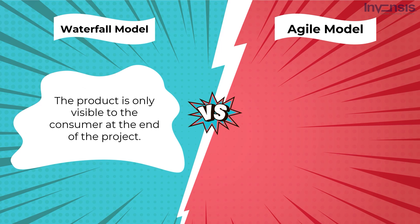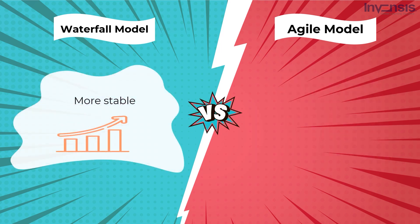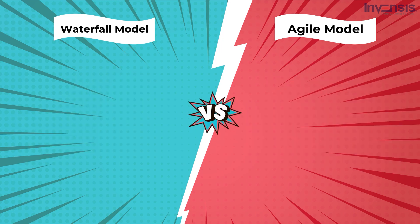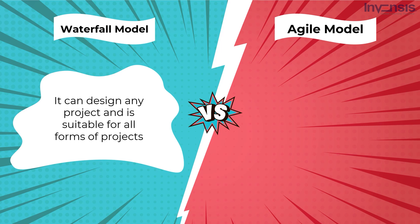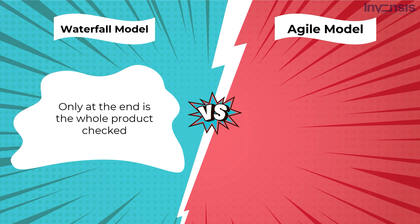In the Waterfall model, the product is only visible to the consumer at the end of the project. In Agile, the customer is given regular and early opportunities to review the product and make improvements. Waterfall models are more stable since they are plan-driven, whereas the Agile model is considered unstructured. In terms of planning, the Waterfall model suits large projects, while for Agile, estimating construction time for large projects is challenging. In the Waterfall model, if a requirement mistake is discovered, the project must be restarted from the beginning.